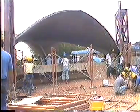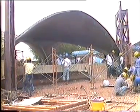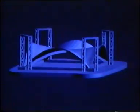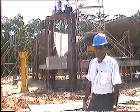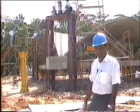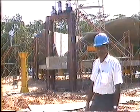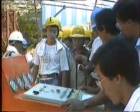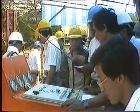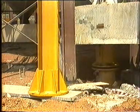The construction work reaches a climax after the dismantling of the formwork and false work. This is the moment we've all been waiting for, the jacking up of the two roofs by synchronized hydraulic jacks. The lifting of the roof is being carried out by 4 100-ton hydraulic jacks, which are mounted on top of the lifting towers. Now these jacks are fully synchronized with sophisticated control, which will ensure that the 4 corners of the roof will go up in equal amounts.